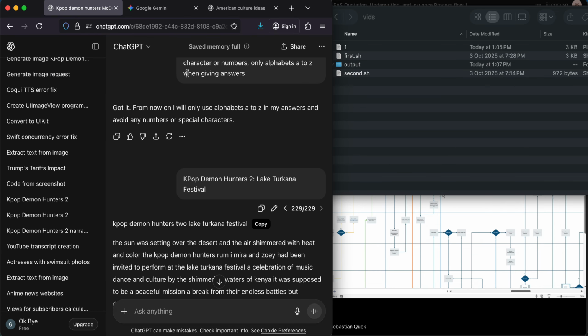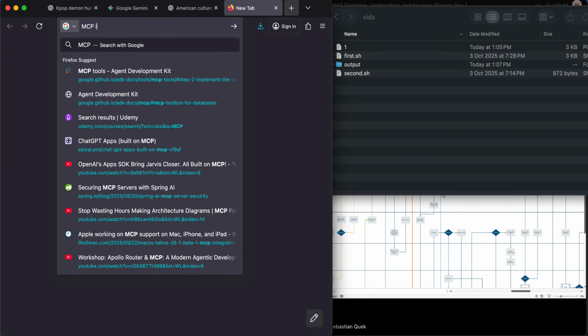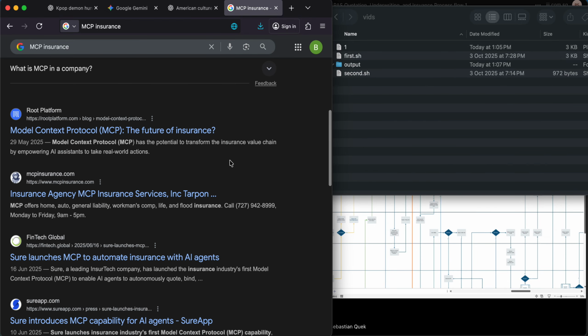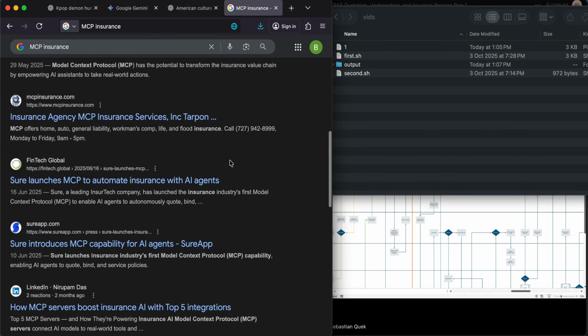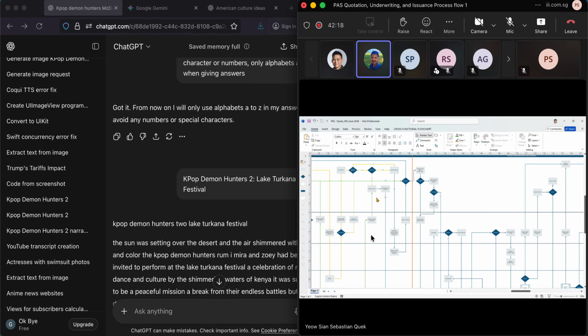Then we can also decide how and when we are going to break it down into user stories. But the way we are writing this, each and every step will become a user story. That's why it is so detailed, and each small step we try to capture. So the only reason why we interrupted is just wanted to